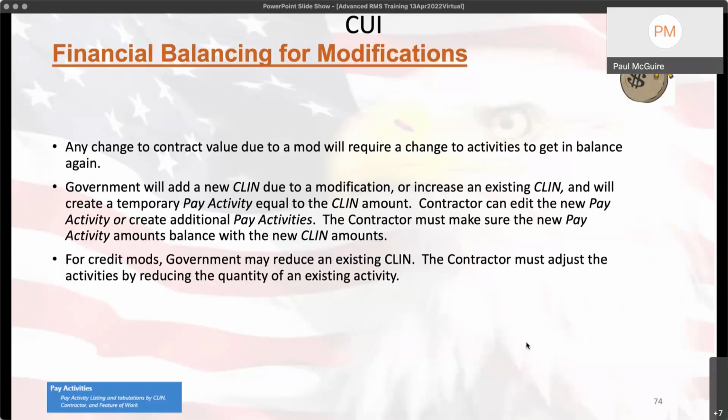Now, of course, the contractor says, oh, hey, there's a delay, or there's an increased cost that wasn't originally scheduled, right, or planned, or resources for XYZ went up real high, whatever. You're going to be going in and you're going to be doing modifications on the contract amount. So instead of going to the award CLINs, hitting edit and changing the amount there, don't ever do that. That'll damage so much you have no idea.